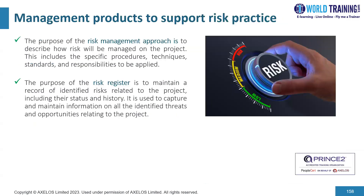There are two documents relevant to the risk practice. One is the risk management approach, whose purpose is to describe how risk will be managed on the project, including the specific procedures, techniques, standards, and responsibilities to be applied. The other document is the risk register, which is used to maintain a record of identified risks related to the project, including their status and history, capturing all identified threats and opportunities relating to the project.